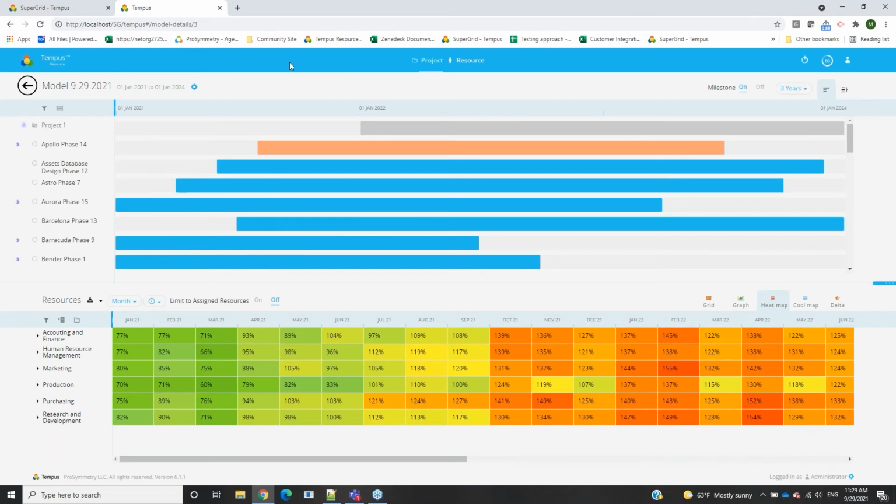So outside of that, the last option that you really have within the bar area itself will be adding some constraints within here. So these are optional. You do not need to add these, but I do find them very helpful when you're working with multiple projects. You're trying to manage when a particular project must start, or maybe when a particular project must end, and then help you identify where you can actually have that project start.